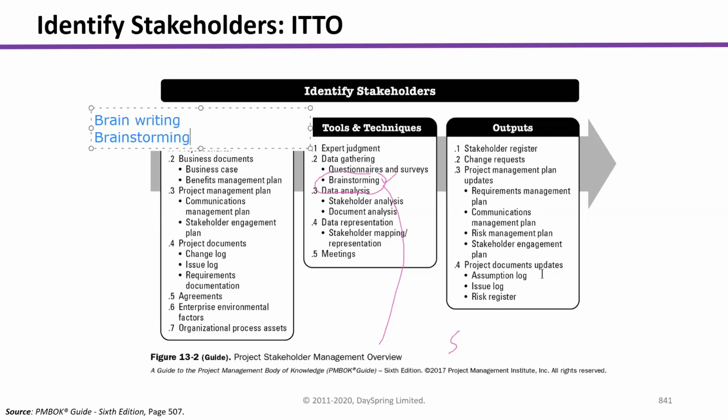It will not be influenced by others. That's why before starting the brainstorming, you should give 5-10 minutes individually to everyone to generate their ideas, and not to discuss or disclose with the team, with the others. Just write down in a document, then when the final brainstorming session starts, everyone will share his or her idea. So that is known as brain writing. All right.